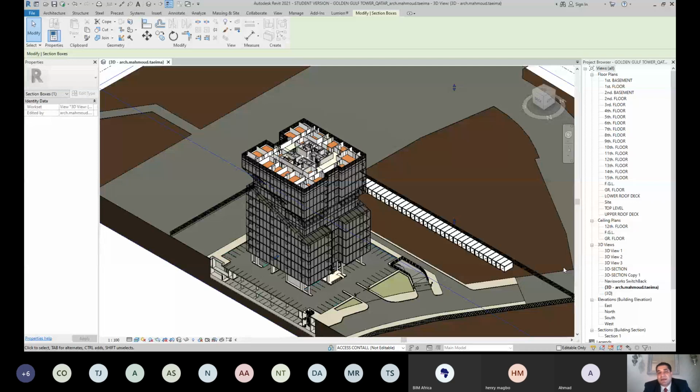It is the same, but how you calculate the start and the finish time for every activity is very difficult. For that you must make the planning in Primavera to calculate what is the work day and off day, and add it to the time of every activity. You must add these off days to the total time for applying this activity. You understand me? Yes, I do.